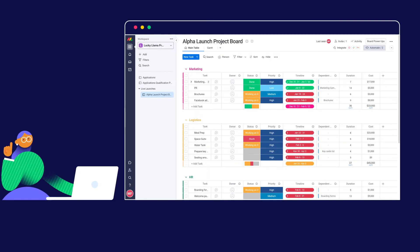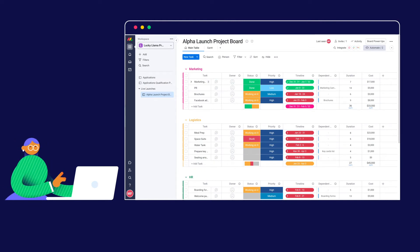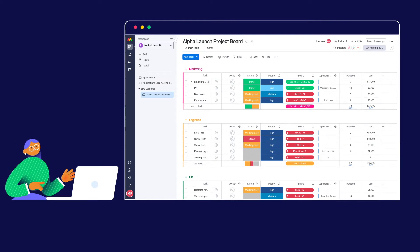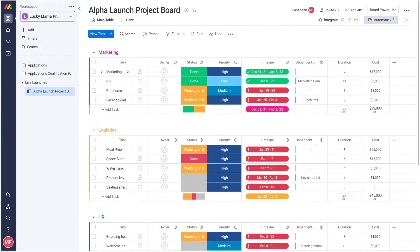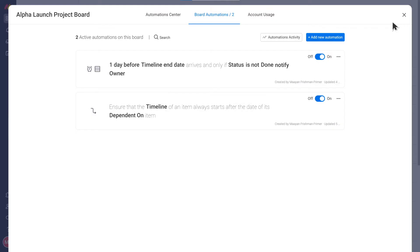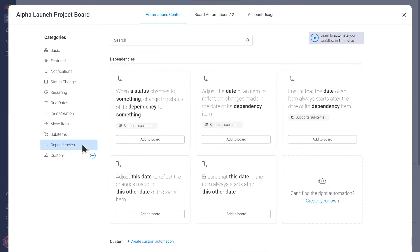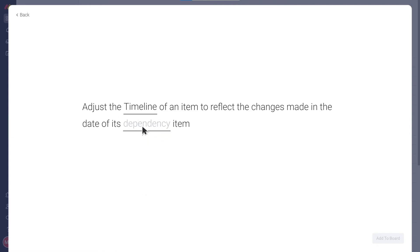Great! Does this automation also update the timeline of any tasks when there are changes made to the timeline of its dependent tasks? No, but we can add another automation just for that. We'll add the automation to adjust the date of an item to reflect the changes made in the date of its dependency item.